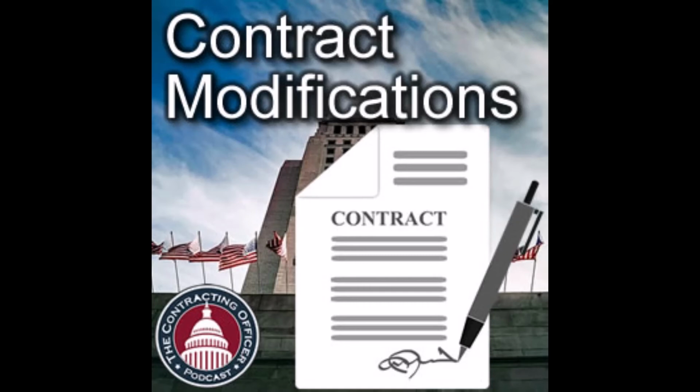You have to be intentional about whether you want to break all these mods up into smaller pieces and get them done, or lump them together and be more efficient. Yeah, sometimes lumping together works in everyone's favor, because separately they might be difficult to negotiate if the government and the contractor aren't seeing eye to eye about the value of a change.